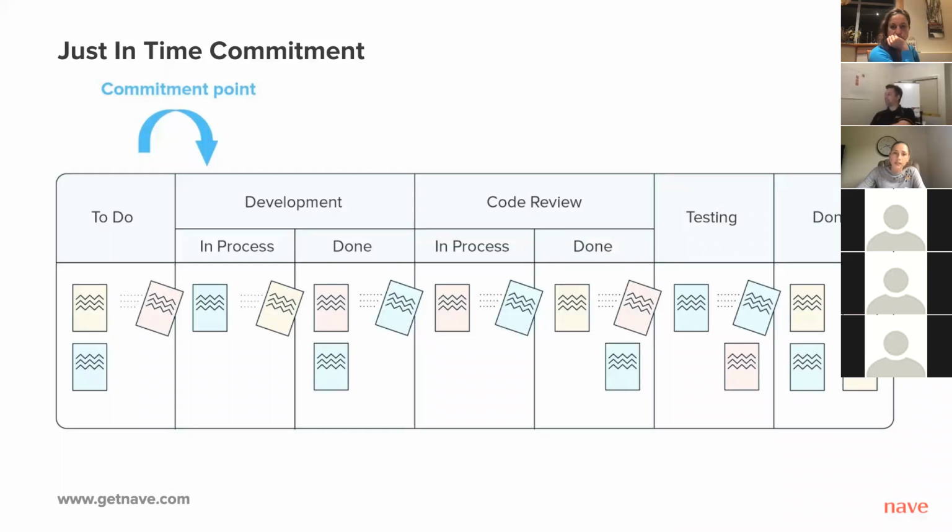This approach provides us with a lot of flexibility, as we are able to reprioritize up until the moment the task gets put in the workflow. Once the work is in the process, it is considered committed, and the team should do everything in their power to meet that commitment. Commitments should be communicated as forecasts. They should come with a range of cycle times and the probability of achieving each of them. For example, we expect this task to be delivered in less than 10 days, and we're 85% certain it will be. And there is a 95% chance to deliver this task within 13 days.